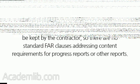What kind of information do progress reports include? Different contracts require that different records be kept by the contractor, so there are no standard FAR clauses addressing content requirements for progress reports or other reports.